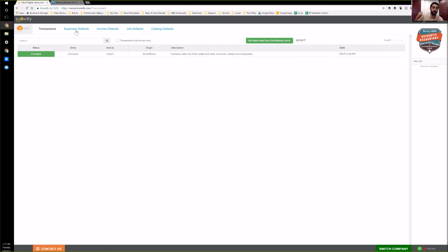You can filter it by things that came in from QuickBooks, and you can filter it by things that aren't on jobs yet. And so that way you can say, all right, show me everything I pulled in from QuickBooks that I haven't costed to a job. And you can just click each one and put it on a job.